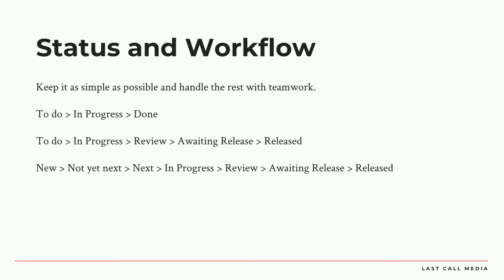Yes? Are you suggesting that it's better to have this status workflow for all of your projects, or do you see often that projects have their own specific workflow? Well, that's one reason to have different projects, right? If the way the project works, by the nature of what it is you're trying to do, is that different, then those should be different projects and different workflows. That's one reason to have different projects, because the statuses are so drastically different. You're working on something different, and it requires you to do it in a completely different way.